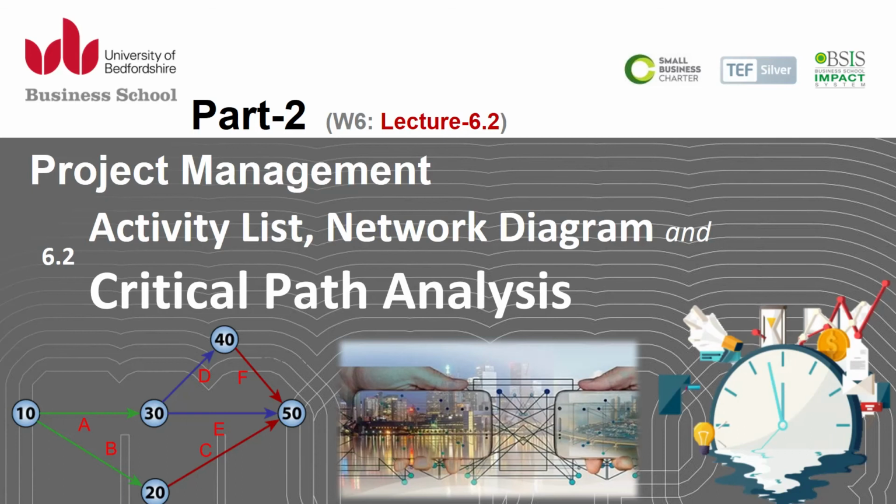For time management, one of the techniques we use is the work breakdown structure. We decompose the project. From the work breakdown structure, we get the list of activities, all major and minor, when we do decomposition or deconstruction of the project, and then we get this complete list of activities to insert in the Gantt chart. Now it is more important for us to make sure how the resources will be allocated and how the activities can be completed one after the other or side by side.